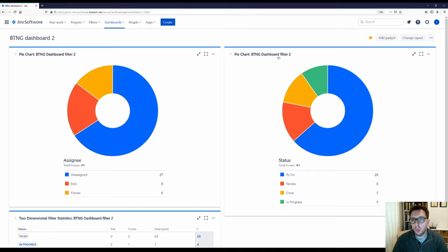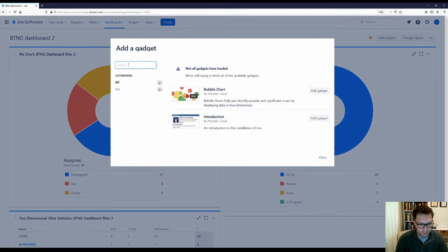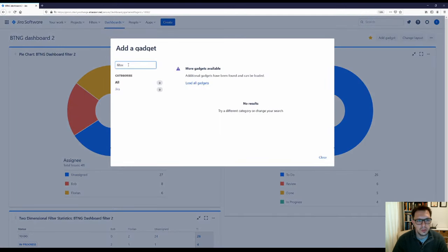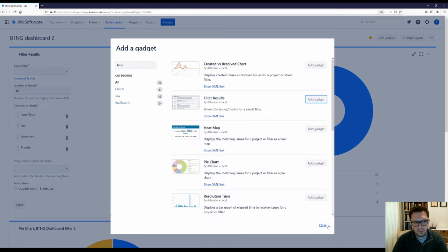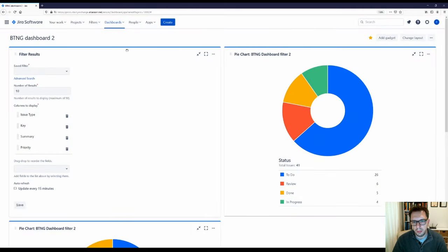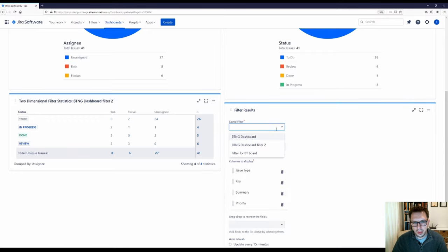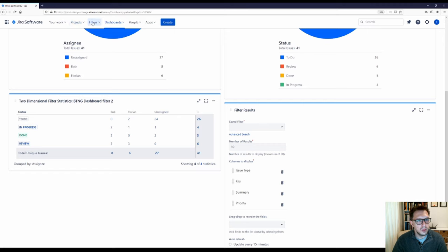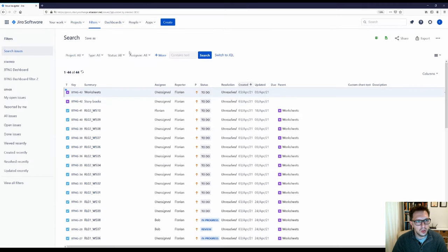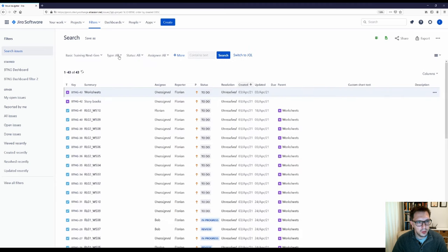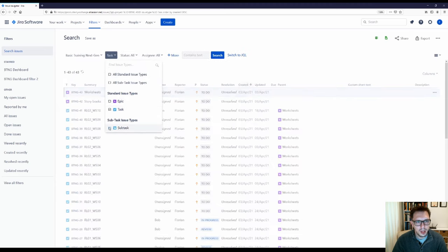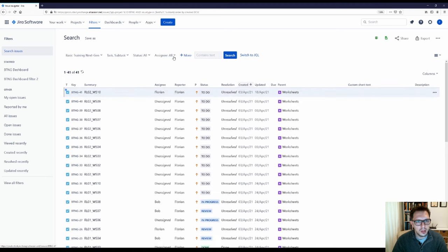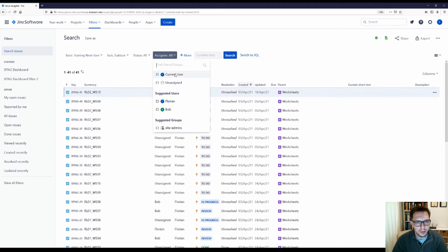I want to add one more gadget — a simple Filter Results. I'll add this at the bottom. Now I'll need to create a saved filter for this, so I'll go to Filters, Advanced Issue Search. I want it to return all items in this particular project, excluding any epics — just tasks and subtasks. Then I'll click Assignee: Current User. What that will do, instead of selecting a specific name, is show different results depending on who's looking at the dashboard.